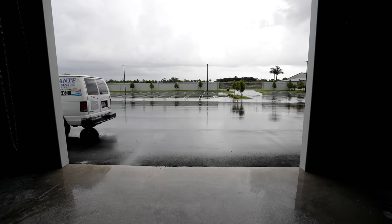Okay, so this is a 41 cat. Correct. And you also have a 46. And we have a 46. So 41 and a 46. And we have a 38 also, which is the one I was running around in Black Point yesterday. Which is a monster as well. Amazing boat. But what happens now is, with the limited availability of engines and parts, we have to pick what boats we're going to build based on availability of motors.